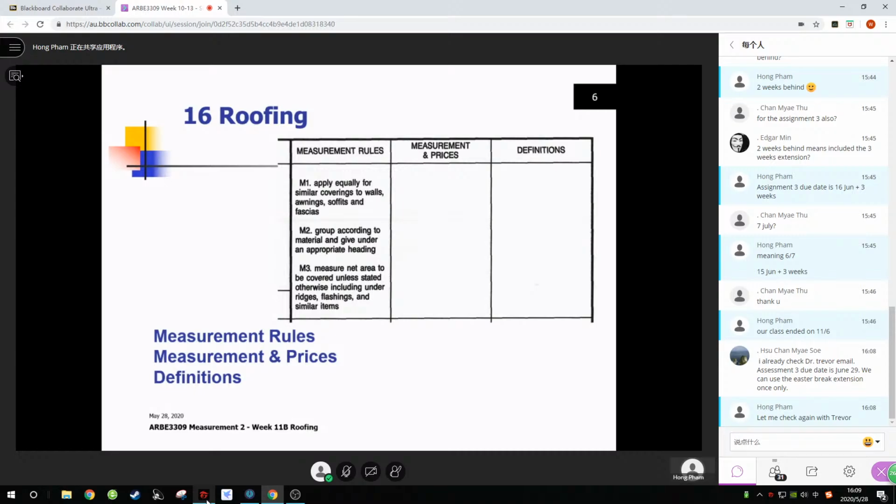It's really, really difficult to price a bill where someone's mixed all the items up. So you want all the like items together, otherwise it makes their life really hard. And you measure the net area to be covered, and I know you can do that because it's the length over the cos of the angle. Does everyone remember that? So you can go home tonight and say, I am a trig expert, I can work out everything to do with a roof by using trigonometry, and you've only got to remember length over cos of the angle. Slide 7, we just covered that.